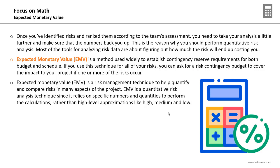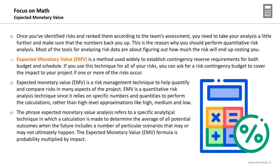The expected monetary value is a risk management technique to help quantify and compare risks in many aspects of the project. It is a quantitative risk analysis technique since it relies on specific numbers to perform calculations. The key difference from subjective analysis is that EMV relies on specific numbers, not high-level approximations like 'very high,' 'medium,' or 'low.' EMV analysis determines the average of all potential outcomes when the future includes scenarios that may or may not ultimately happen.